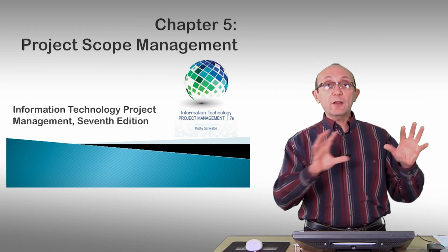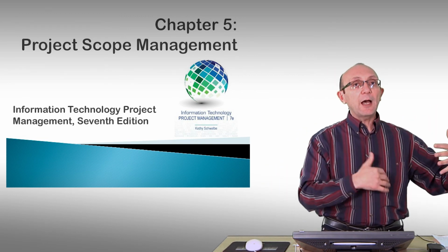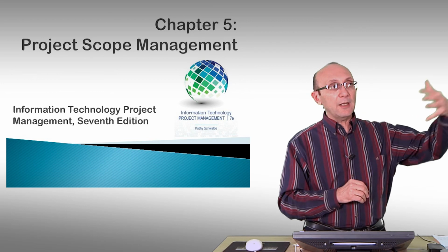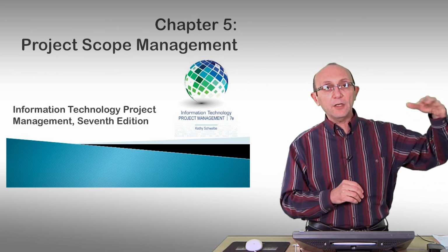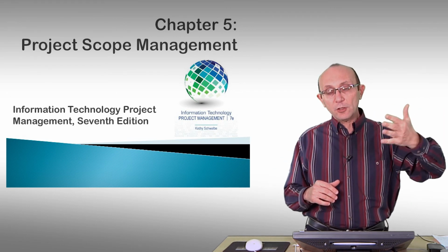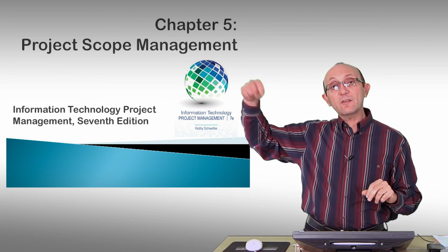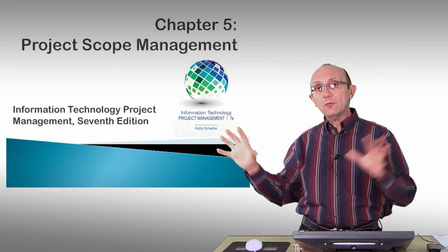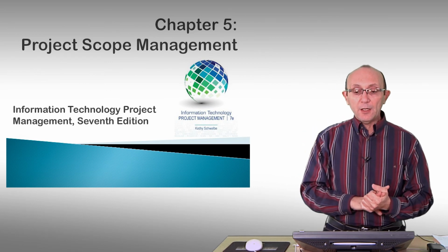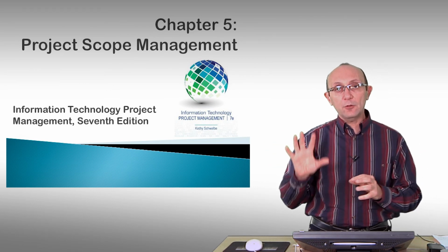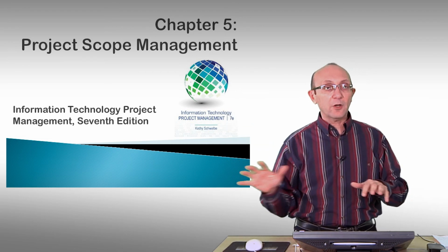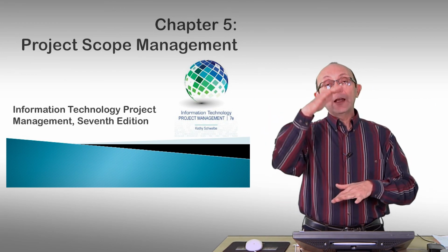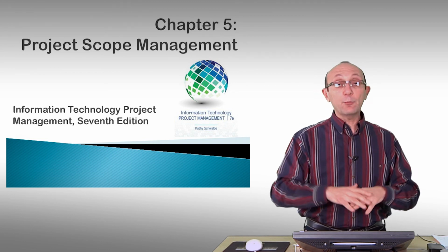Just to summarize, you start with a charter, which is a very high level, uneducated, uninformed understanding of what the project should look like. And this will be done normally at the very early stage between the company and the customer. And then you would start with the charter and with the project description, and go back and start sketching some prototype at sufficiently sophisticated detail, horizontally and vertically. Once you've done that, you come back with an elaborate description of what requirements should be, and that defines the difference between what the customer wants and what the customer needs. You define the latter one. You put them down into a scope, which is a detailed description. You can see it as an elaboration of the charter.